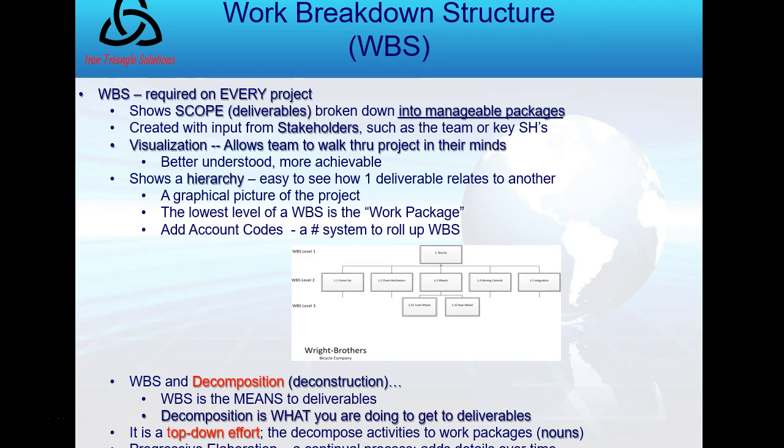So it's hierarchical, I've mentioned. It's a hierarchy. It looks like an org chart that you see in the middle of the slide. But that doesn't have the details we need. The details are in the WBS dictionary. So I have two things here. In Create WBS, I am creating my actual hierarchical work breakdown structure. And I'm creating my WBS dictionary, which are the details inside of each box there.